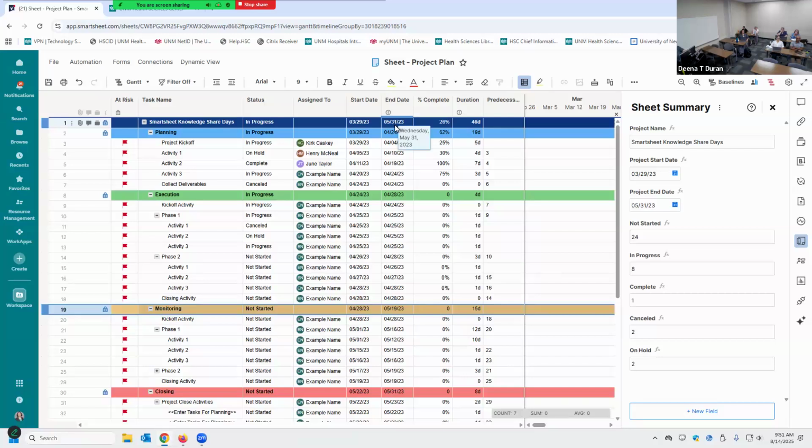So it states, because I have predecessors set, because I have parent-child relationship set, that these will automatically change as my project goes on. Which on one hand is nice because it makes things really dynamic. Like, okay, this task, if I go back and I'm like, it's gonna take 10 days to do this, and we get to it and we're like, no, it did, and it's actually a 1 day thing. What was I thinking? We were fine, it was fine. We can see our schedule fluctuate with that.